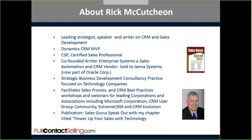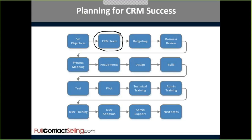Today we're going through the step-by-step process of laying out a Salesforce automation project. Here's the process: step one, set your objectives; step two, put your CRM team together; step three, budgeting; four, business review; five, process mapping; then requirement design, build, test, pilot, technical training, admin training, user training, user adoption, admin support, and next steps. This may sound complicated, but it's not. Laying it out like this gives us a step-by-step process and allows us to say where we are and what we need to do next.